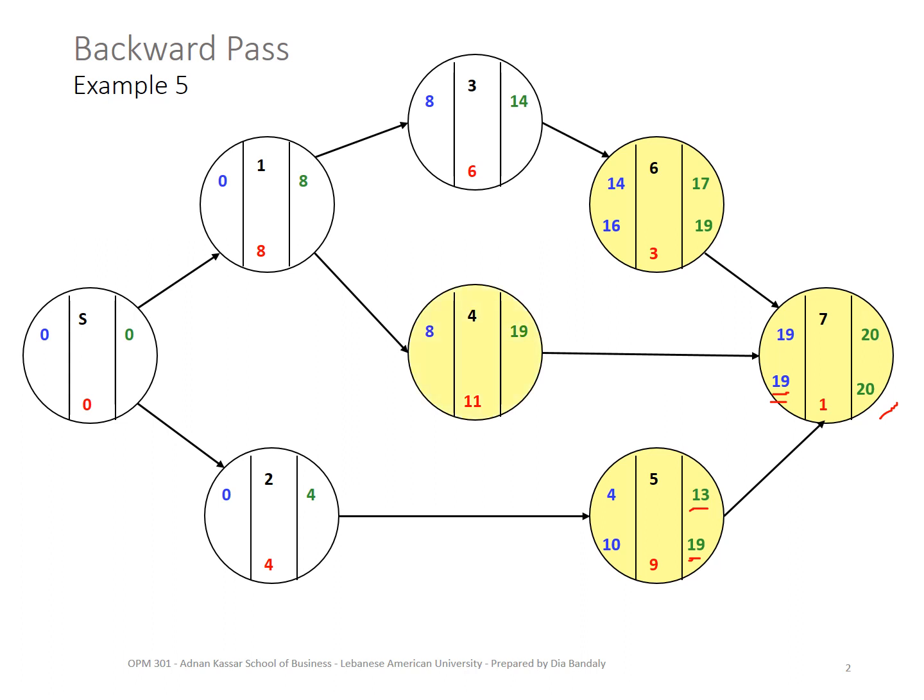Then activity 4, also 19 here, minus 11, that's 8. Activity 3, it's 16 minus 6, that's 10. Activity 2, 10 minus 4, 6. Activity 1, what do you think? Before I tell you, why don't you pause the video and think about it? What do you think would be the latest finish for activity 1?